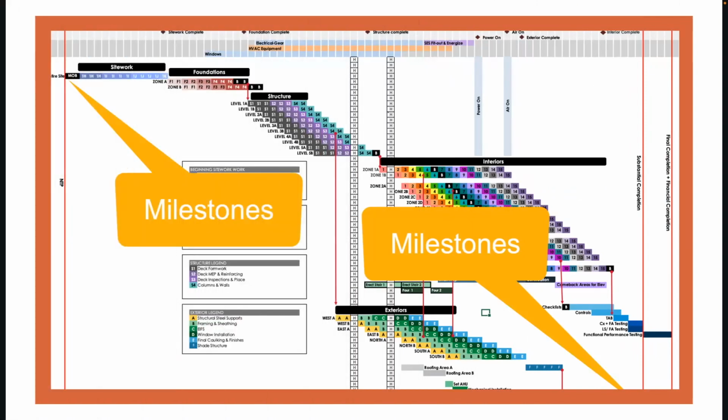So when you are developing your Takt plan and you already know what your programs are and your projects and how they're laid out, you'll want to start building your Takt plan on the project level. Now you can do this in one of two ways as you start with milestones. You can have the start date and the stipulated end date. That's what it's called if it is given to you. You can have those given to you or provided, and then you as a Takt practitioner can fit in the